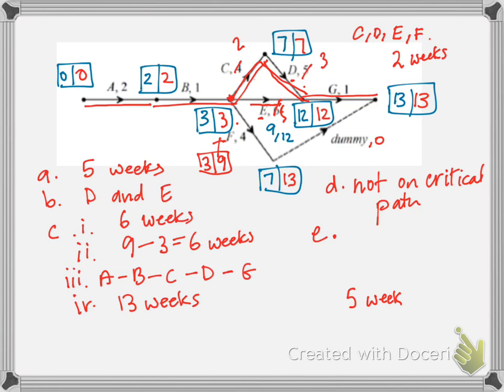But we still need to work out how that is going to affect the critical path. Now, I appreciate this is going to get a bit messy, but I'll just put in a new critical path if we reduce those activities. So put in the boxes. Now we have 3 and 2 gives us 5. And then 5 and 3 gives us 8. And if we had looked through E, well, 3 and 5 also gives us 8.